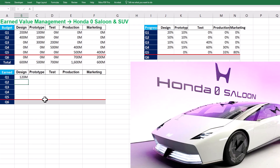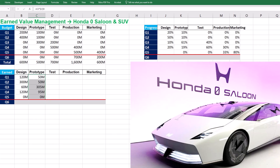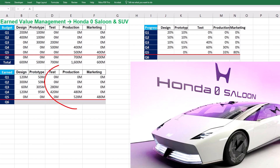We should replicate the formula up to Q5, which is our status date — this is why Q6 is grayed out. The earned value for prototyping is $50 million in Q1, and we should replicate the formula up to Q5. Earned values of tests, production, and marketing are found in the same way.